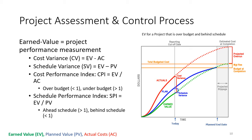Looking at this chart, we are behind schedule — the green line is below the blue — and we are above cost — the red line is above the blue. Using those two projections, we can project when we will complete the project in terms of both cost and time, shown on the right-hand side as the projected schedule overrun and budget overrun.